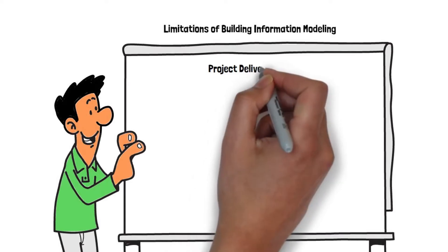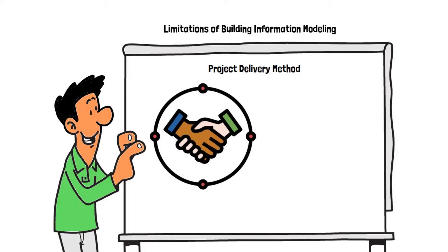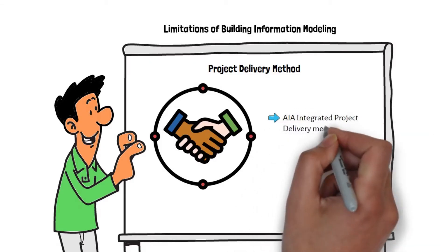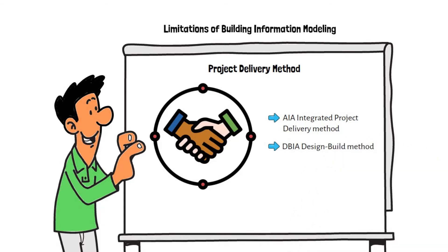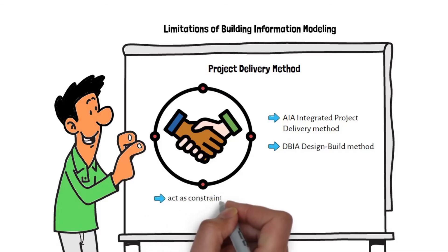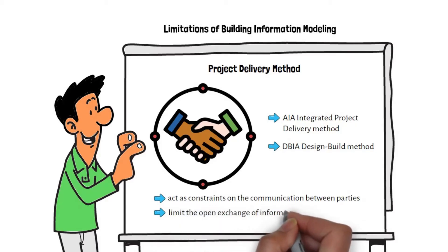Limitations of Building Information Modeling. Project Delivery Method: The key factor in BIM is the collaboration and cooperation of parties involved in the project. A collaborative project delivery method such as the AIA Integrated Project Delivery Method or the DBIA Design-Build Method aligns best with the collaborative intent of BIM. While there are examples of construction manager at risk and design-bid-build projects using BIM, the contractual relationships between the owner, architect, and contractor can constrain communication and limit the open exchange of information.